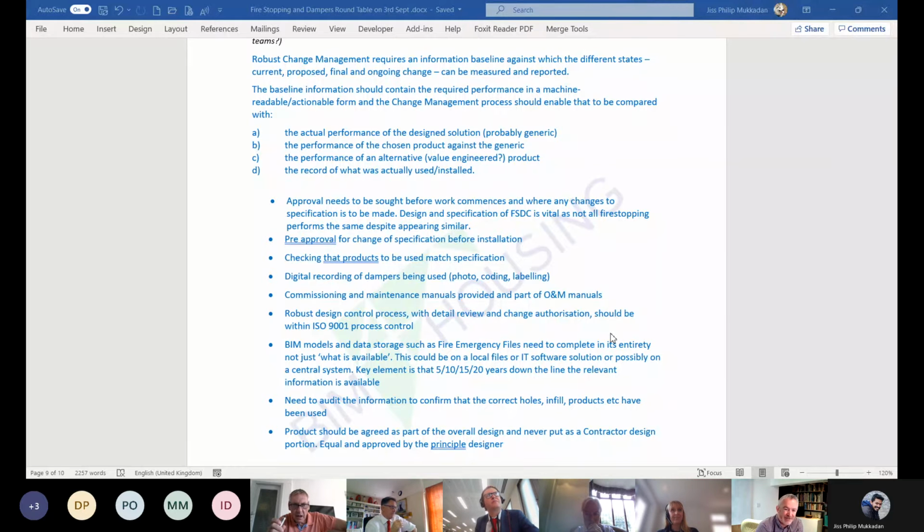Yeah. The key with change, though, isn't it, is when change comes in a project. So in the early stages of projects, change can be very fluid, and it's part of the process of developing a building. It's an architect, an engineer, an MEP consultant, all managing to a point. But there's certain stages when the management of the change needs to become more rigorous, because a process needs to be rerun to assess it. So in those early stages, we're designing layouts, we've got structural engineers designing frames, we've got M&E people giving us zones. And then there's those changes that come that have impacts that need to rerun those things. So change management is an interesting one because it has different impacts at different stages in the project.